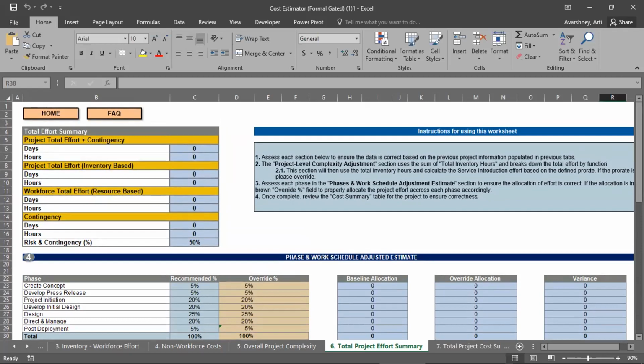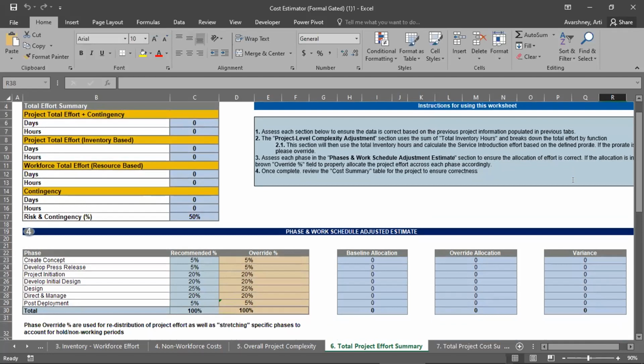And then the contingency that you are going to calculate. Contingency, like we can say 10%, 15%, 20%, that comes over here. If you put risk and contingency as 10% in the first screen where you have entered the risk and contingency, that will flow over here, and then you will recalculate the figures on top that includes contingency too.